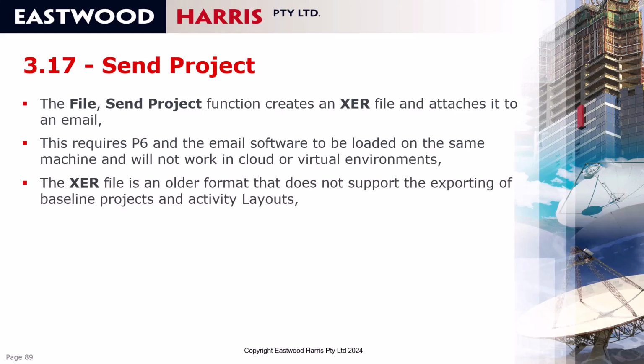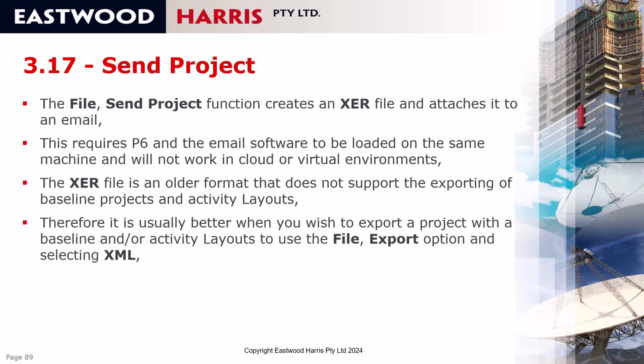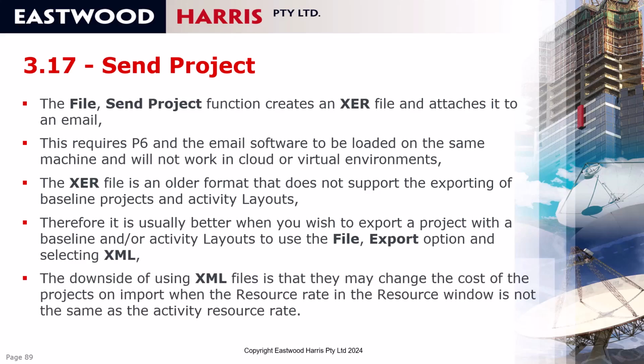An XER file is the older file format. It doesn't support the exporting of baseline projects and activity layouts, and if you wish to export a project with the baseline activity layouts, it's usually better to use the file export option and select XML. The downside of using XML is that it may change the cost of a project on import when the resource rate in the resource window is not the same as the activity resource rate. So both formats have their own issues.